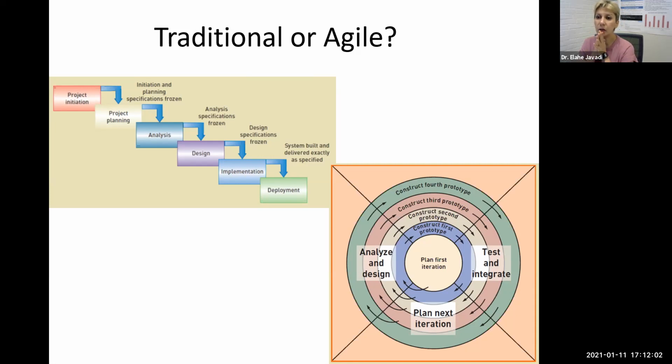Anissa is giving us a reason why we choose waterfall in some organizational settings or for some projects, because the requirements are well known and the organization values the structure over flexibility. So in government institutions, in military, in some projects that have been done over and over again, you may choose to go by waterfall or a variation of it.